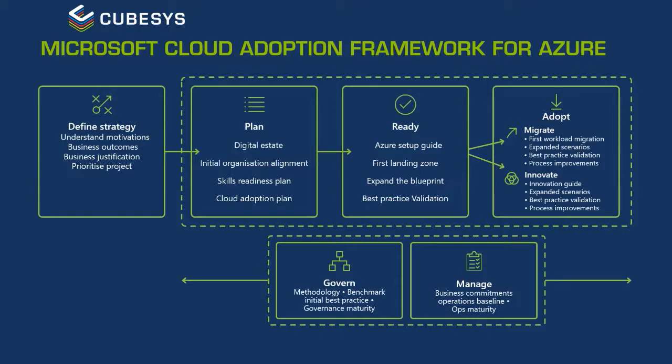You should always have your governance and your manageability in mind, because the person that might be delivering it may not be the guy that manages it, and you need to make sure that they're always talking. I've had a few issues where I've gone to develop something or deploy something, but the person that's going to be operationally responsible for it doesn't fully understand the solution, and that becomes a real risk. So you want to make sure that handover is nice and clean, and that the feedback loop's always there.